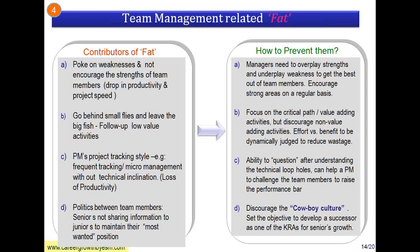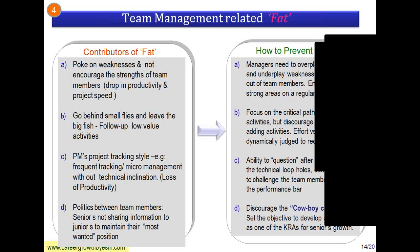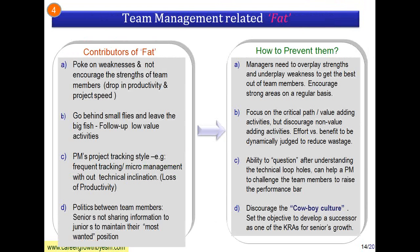Then there is the PM's project tracking style. When you give work to someone and they say it takes five days, going every single evening to ask what happened will get everyone irritated. At most, on the fourth day evening you can go and ask if they will complete by tomorrow. Micro-management may not be liked by many people. Also, when tracking you should know how to ask the right questions — is the team member bluffing? You should be able to ask the right questions, find out technical loopholes, help them, and challenge team members to increase the performance bar.